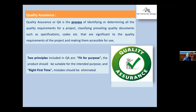Quality assurance includes two principles: fit for purpose — the product should be suitable for the intended purpose — and right first time — mistakes should be eliminated. Whatever material we are selecting for the project should fit for purpose. Before putting it to use, we confirm through many tests that the material is the right kind. After satisfying many parameters, only then do we accept the material.